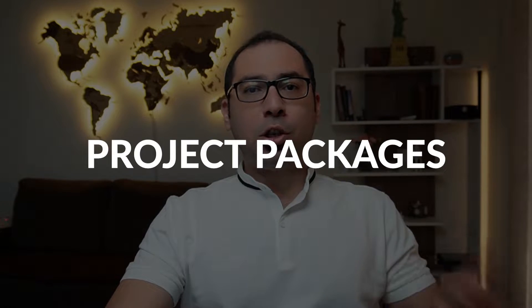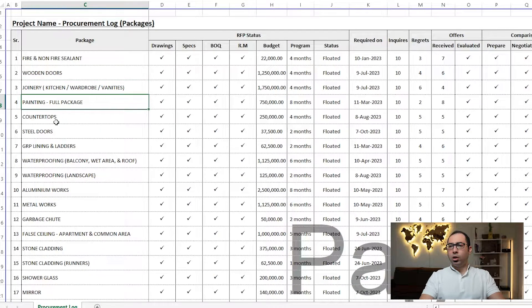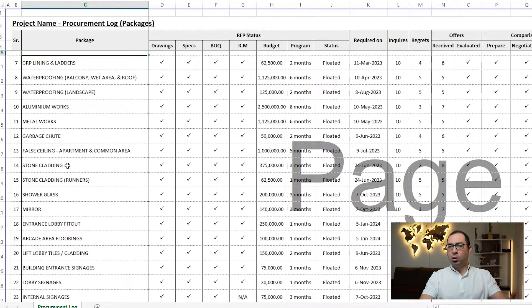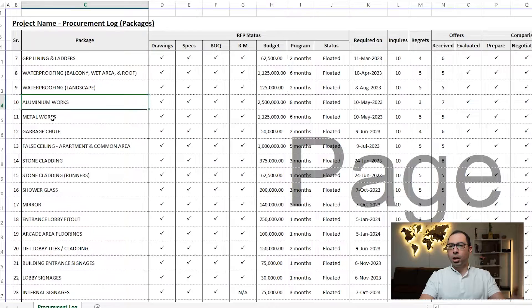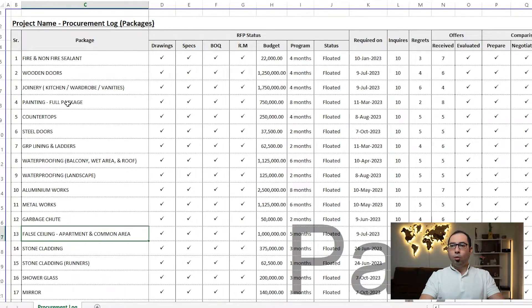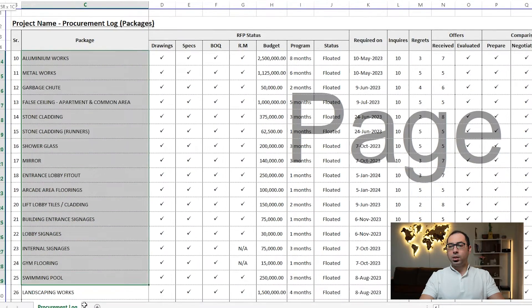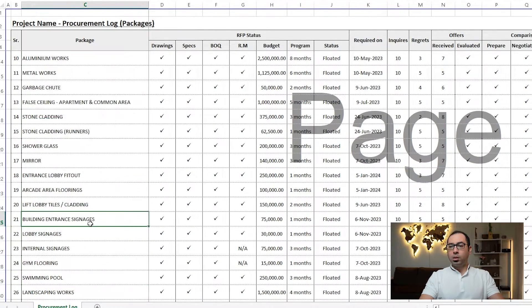The first thing I would do is to make project packages — what are the packages that we need to procure in our project. We can have a list like this of all the packages: wooden doors, joinery, painting, countertops, steel doors, aluminium, metal, stone cladding, full ceiling, and so on. A list of all the packages in our project that requires procurement.